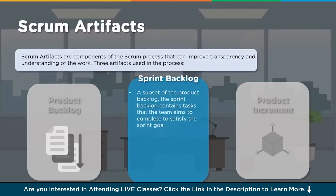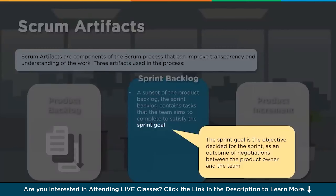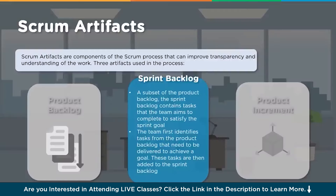The sprint backlog contains the tasks the team aims to complete to satisfy the sprint goal. The sprint goal is the objective decided for the sprint as an outcome of negotiation between the product owner and the team - what can be delivered, how long it takes, effort, time, and costs are all discussed and agreed. Once agreed, the team identifies tasks from the product backlog that need to be delivered to achieve the goal, and these tasks are added to the sprint backlog.